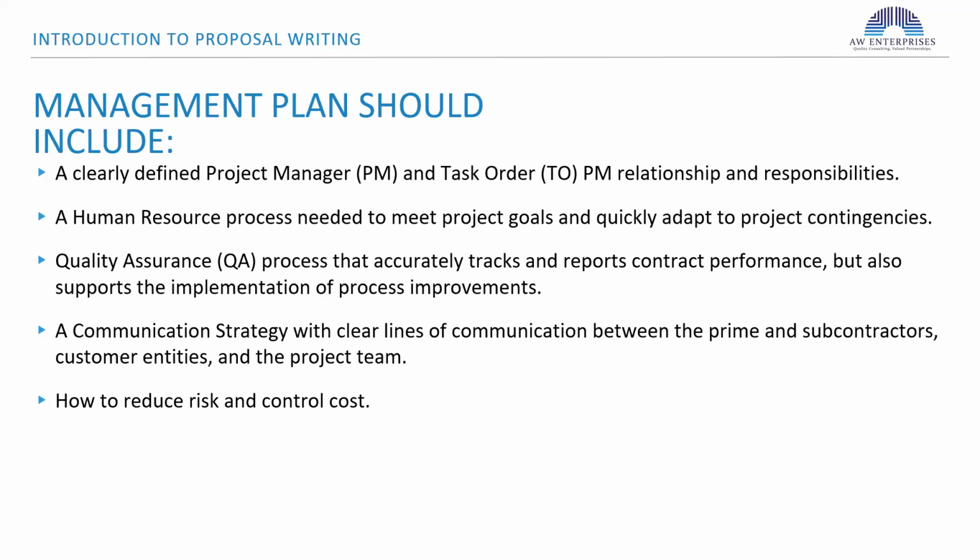And so the government takes most of the risks in those cases. You rarely see those now, but in the DoD area and some other agencies, for research and development and software development, you'll see the cost plus fixed fee type contracts.